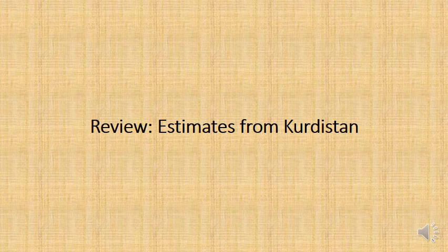As I said, there are some other good estimating methods, but because of the lack of research in Kurdistan, because it's such a young country and we haven't really had good researchers to develop the other estimating methods such as cost capacity curves and total installed cost factor methods, they can't really be used for the time being. So really we just have to use itemized estimating methods for the most part.